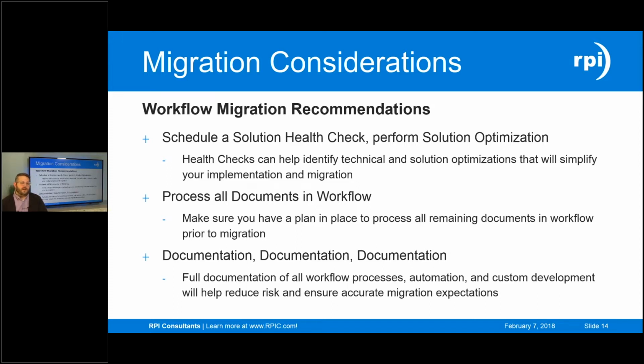Because the document conversion process is something that is probably done in steps and probably done offline, you want to be sure that everything in your workflow, and this is going to be during a migration project, not really during the planning phase, but you want to make sure that everything in workflow is processed through, that you don't have anything lingering. And in some projects, there may be a need for some concurrent workflow. We want to try to avoid that, but if we have to, we can handle it.